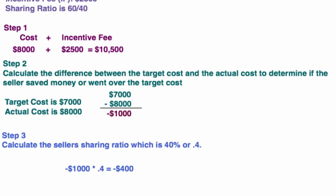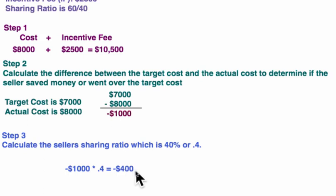Step number three: calculate the seller's sharing ratio, which is 40% or 0.40. We multiply the $1,000 overrun times 0.40 to get negative $400 — that is $400 we will be subtracting from their payment.